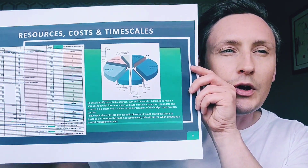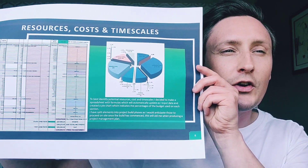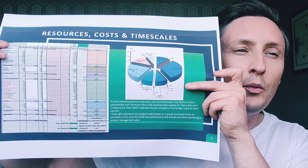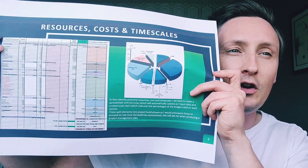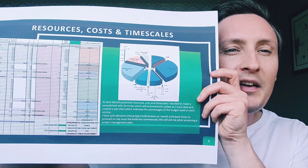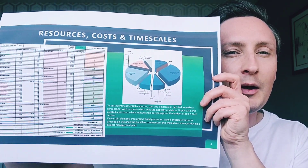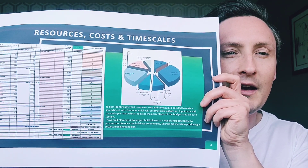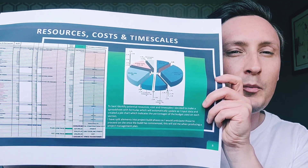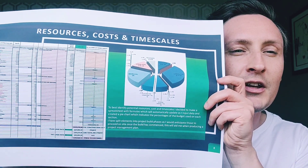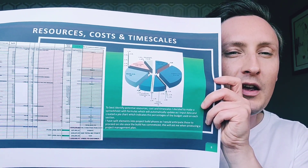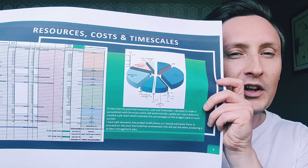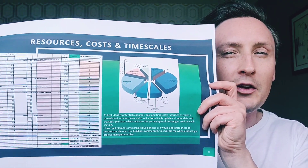The next thing I did was to identify resources, costs and timescales. I produced a spreadsheet and a pie chart which takes into account the elements of timescales and costs. To best identify potential resources costs and timescales, I made a spreadsheet with formulas which will automatically update as I input data, and created a pie chart which indicates the percentage of the budget used on each section. I split elements into project build phases as I would anticipate those to proceed on site once the build has commenced. This will aid me when producing a project management plan.